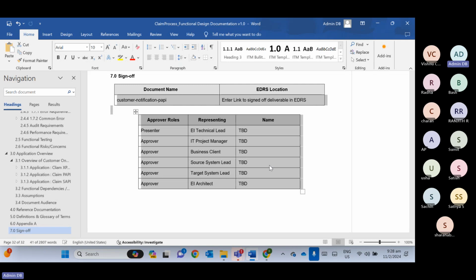Okay, first thing, is it a new API or an enhancement. Second, if enhancement, then do we need to do a small change like a property file change and then testing, or do we need to do some kind of business logic orchestration, some kind of business logic change, some kind of additional orchestration. So if only a property file change, one story point will be good enough.